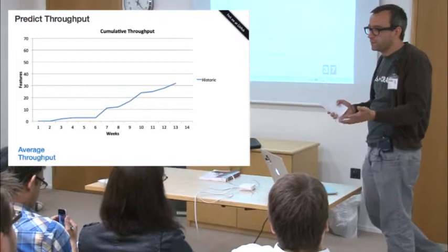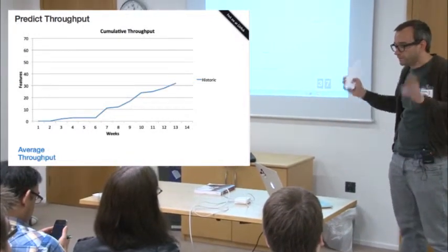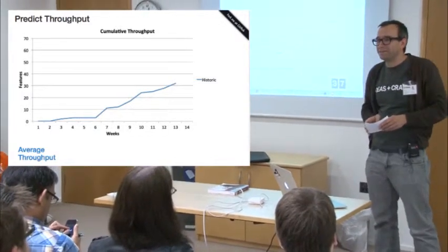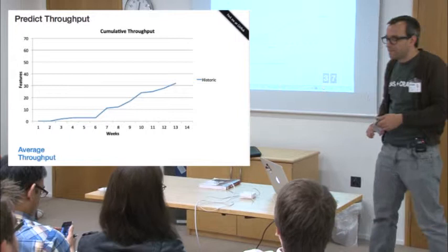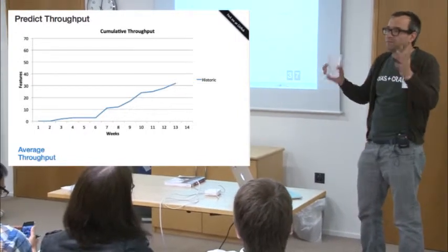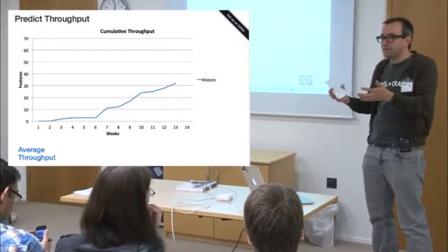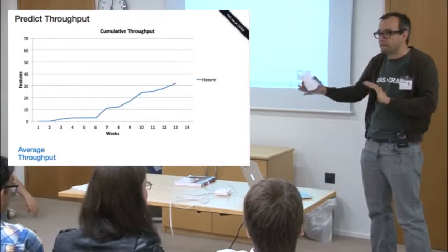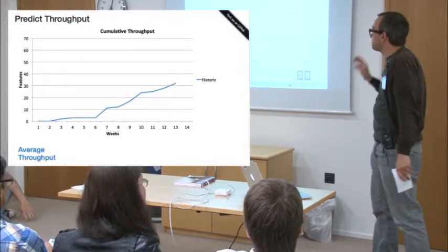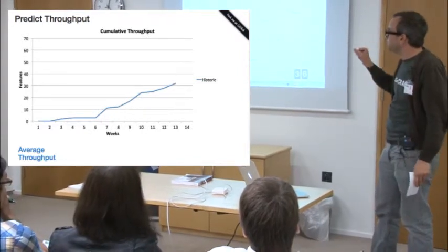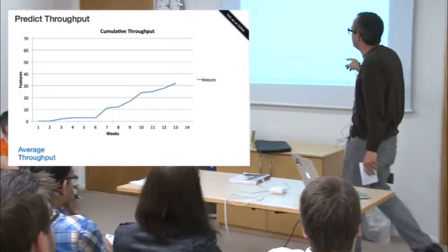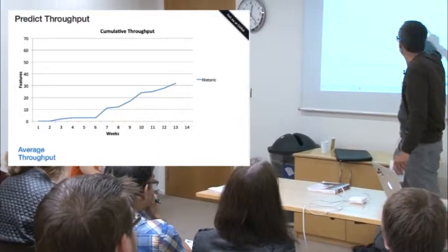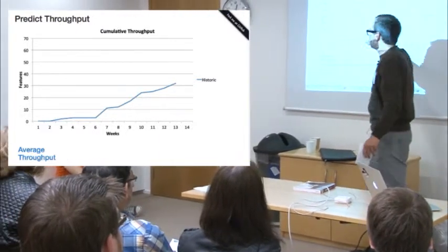The man hours one, because of the non-linear nature of software development, ask Dan Brown to talk to you about man hours as a metric, but basically the text says it all. Story points, well, let's not get into that, but the relationship between story points and the actual time it takes to deliver something is variable, to say the least. Throughput I have found to be pretty reliable. Two things about it though. One, it's non-linear. So the classic S curve you see here, we're slow out of the gates and then we hit our stride, with some interesting exceptions which we'll come into.